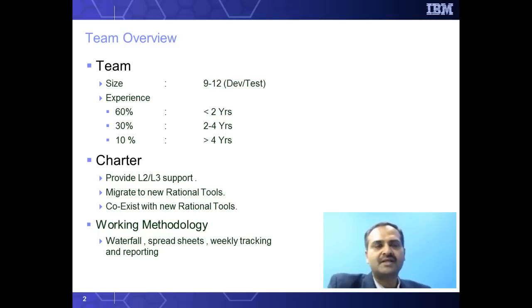Considering today's working methodology and at that point in time, I feel that we used to spend a lot of time in the weekly meetings. It was difficult to know if someone is blocked until that meeting happens or a follow-up is done during the week. And since there was no history tracking or consolidation of the discussions at a central place, we would often spend a lot of time revisiting that issue without much value add.